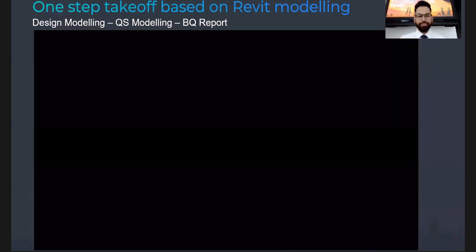That's from the Gordon QBcost, the whole system of how we connect the quantities with the BOQ and live link all of them. So because the model is connected with the BOQ, what happens is that when we make any changes in the model, that gets reflected into the BOQ automatically. So that's automated.